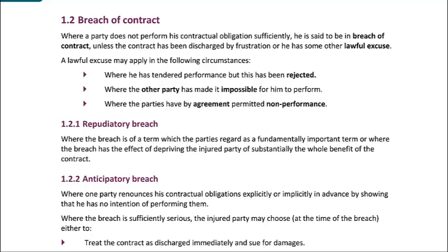So, what is a lawful excuse? Well, it's where he's tried to complete the contract, but basically the other side have made it difficult for him to do so. So perhaps your builder turned up and tried to get into your house to finish his little bit of skirting board, to finish off the extra jobs, but you've decided his work is shoddy, you don't want him in your house anymore, you've rejected it, you won't let him in. So if you say no, or if you basically just change the locks, lock the door, don't let him in, don't let him come and do that work, then he's going to have a lawful excuse.